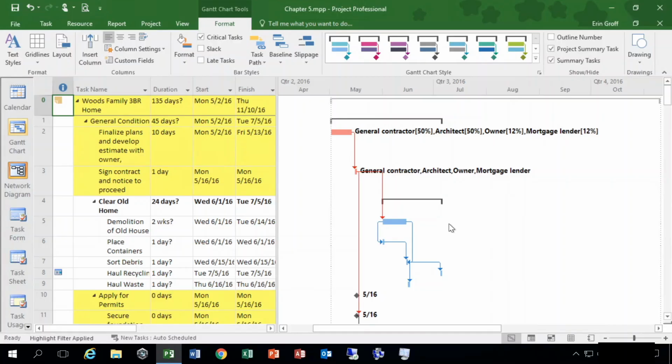All right, page 93, Methods of Optimizing a Project Plan. Once you understand your project's critical path, you can make changes to the tasks and assignments of the path to optimize the overall project plan. For example, if a task is causing the duration to extend beyond a goal end date, you can add resources or modify the dependency of the task. You may be able to shorten the duration of a task by adding another person to complete the task, or you may realize that a task can start sooner than the finish date of its predecessor.